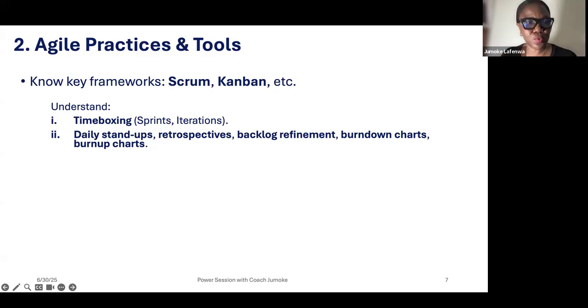And that is presented to the development team or the project team. And it is from that product backlog that has been prioritized that the team will pick what they can work on. Now, what they can work on is dependent on the velocity of the team. The velocity of the team is dependent on the total story points they can accomplish. The story point is based on the task. In adaptive, we don't measure time, we measure effort. So the story point is a reflection of the effort it will take to get the work done.